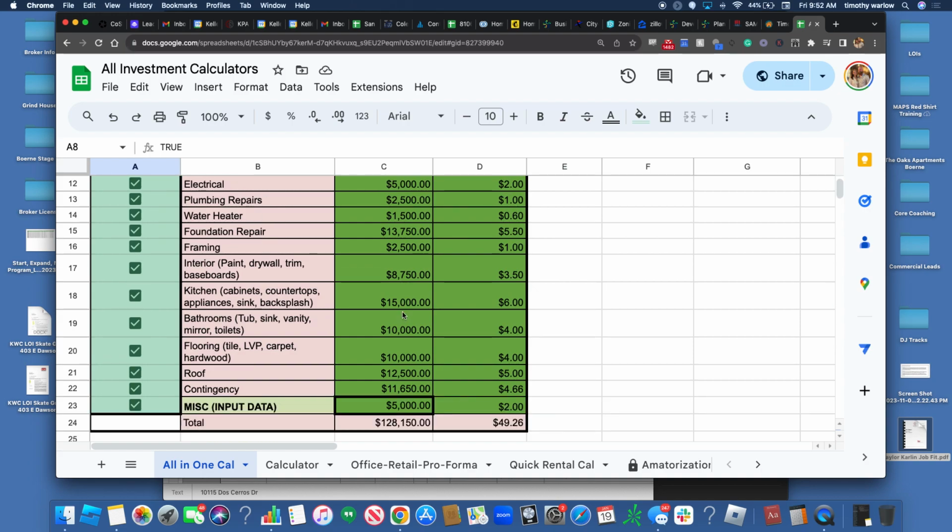Just for reference, like Cedar Knoll, which included an addition, came out to $43 per square foot, and it's a relatively new house. We didn't have to upgrade things like electrical, but we did add a whole room, so that wound up being on the high side. It used to be $30 per square foot for an entire rehab from start to finish. I think it's now, if you have to do a whole house, expected to be about 50. That's just cost wise. And so you go through.